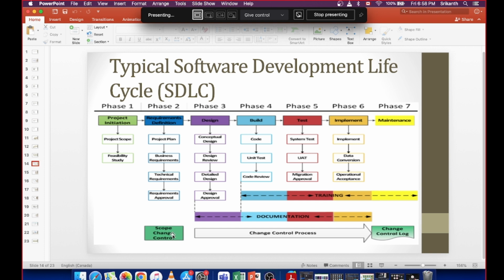So depending on the situation, the project team, the delivery leads from the project, and the business people will sit together. They're using some change control process, whatever is established in the company. They will decide if it has to be a part of release 2 after this implementation, which will be added in another 3 months or 6 months based on the size of this change.